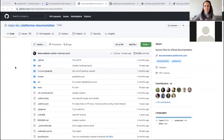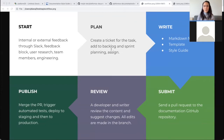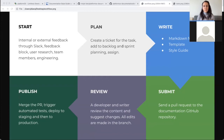Let's go through the steps of our editorial workflow. When we get internal or external feedback through Slack, the feedback block on our documentation, user research, team members, or engineering, all of these requests are considered tasks regardless of where they came from. The process starts with creating a ticket for a task. Once the ticket is ready, it goes into the backlog of our internal sprint planning where we discuss priorities, and the selected tickets are added for the next sprint. Then the author writes content or makes changes to existing content — the author can be any team member or community member. When content is done, the author sends a pull request to the documentation GitHub repository. A developer and a writer review the PR, they suggest and discuss changes, and once it's final, we approve and merge it.